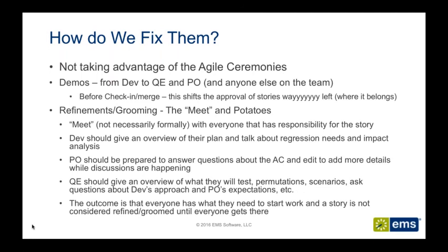because as everyone is sensitive to having many meetings on their calendar, we want to be sensitive to that. But we want to make sure that when we're refining and grooming work before the work starts and before that work gets tested, we're having those checkpoints and collaboratively talking about different scenarios that we have thought about after the initial, say, feature refinement or planning. So it's kind of this stepped and tiered refinement that we like to have, so that by the time work is starting, the team that's responsible for doing all the work associated to that story knows exactly what's being done, and each of their voices has been heard.